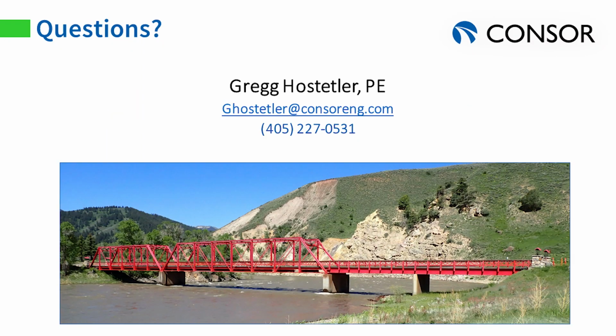So with that, I think maybe I have a little bit of time for a couple questions. I'll repeat it. How much was the cost? So the initial cost for the emergency repairs, the guaranteed maximum price, was $620,000, but that actually included design, all of the construction, and all the contingencies. So we actually brought it in under that. I just don't know what the exact number is that we came under. The second phase is the one that I'm still trying to get the data from the contractor on.